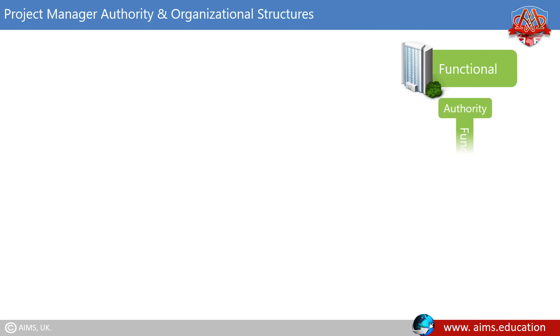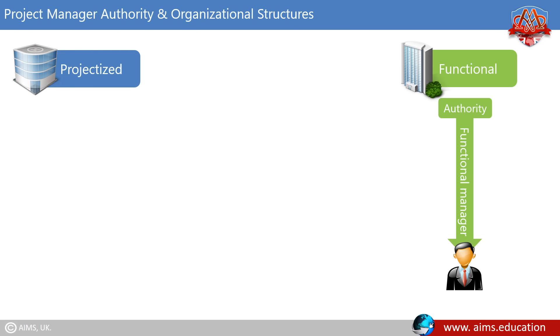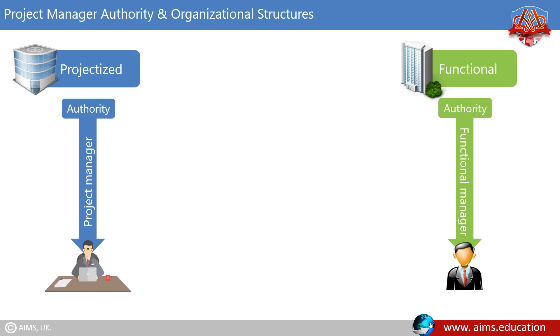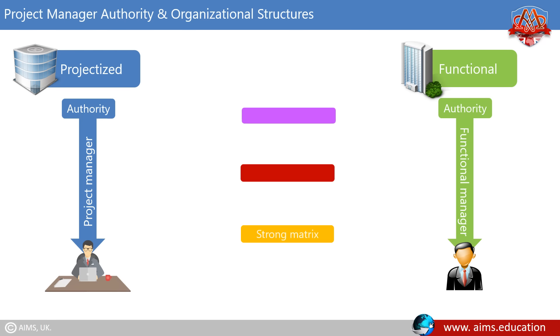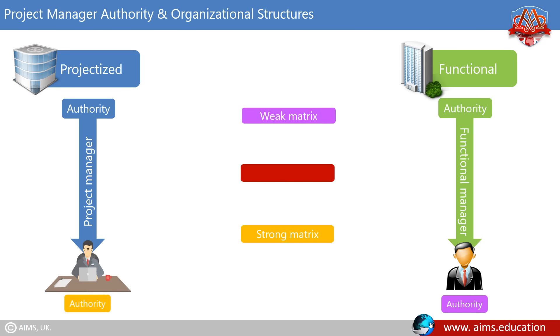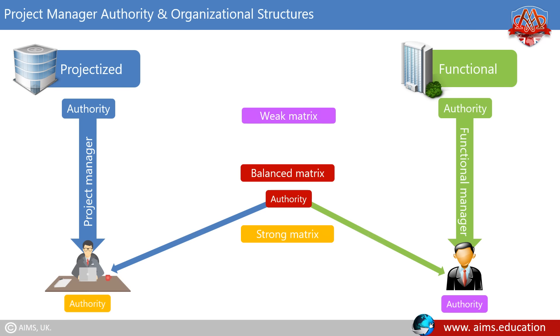In a functional organization, project authority rests with a functional manager, and in a projectized organization, it rests with a project manager. A matrix organization tries to be somewhere in between these two. In a strong matrix, the authority is with the project manager, just like in a projectized organization. In a weak matrix, the authority is with the functional manager, just like in a functional organization. In a balanced matrix, the authority over the project is shared by both the functional manager and the project manager.